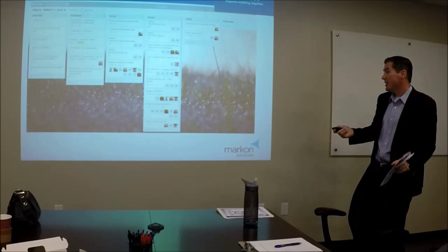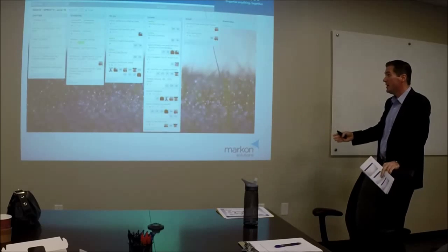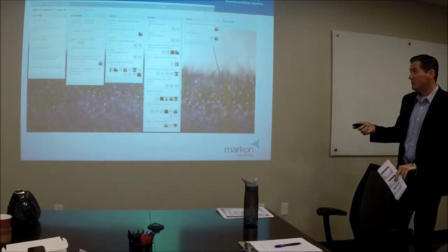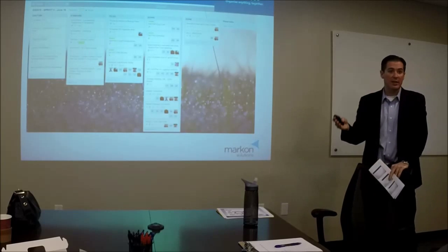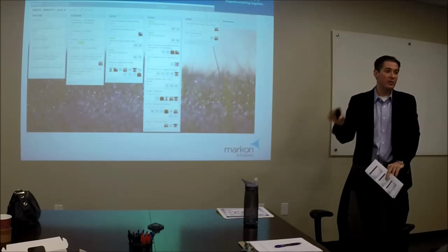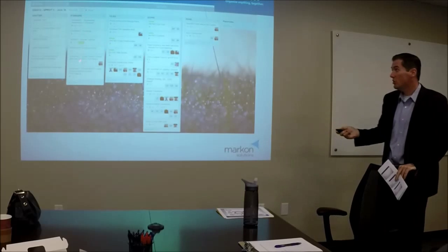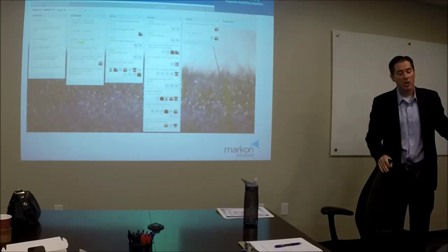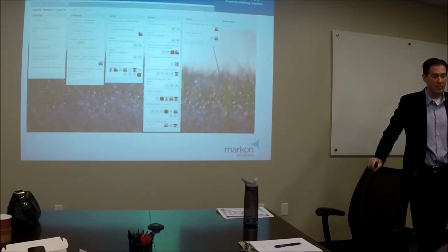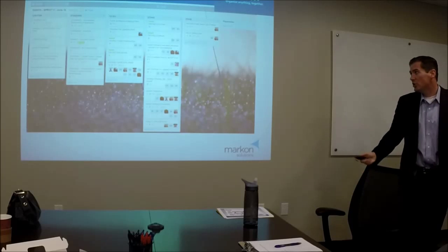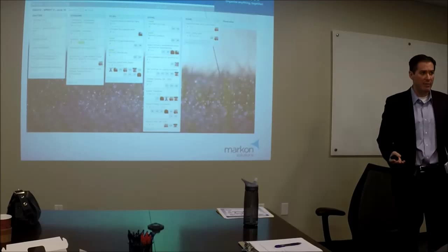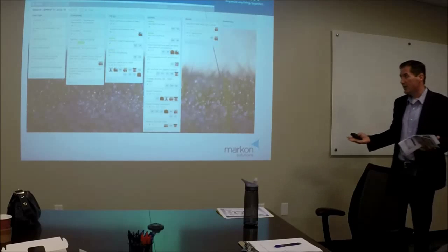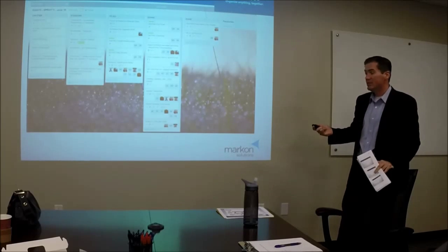I said it's so important to do to-do, doing, done, but we do a couple things differently on some of these teams. We have something called standard, which is basically operational type work, where we're going to do this no matter what. So instead of meeting as a team every sprint saying, should we start to collect BD opportunities again? Well, yeah, BD opportunities are one of our key metrics as a team. We're always going to be collecting them. So we have that marked in a standard column.